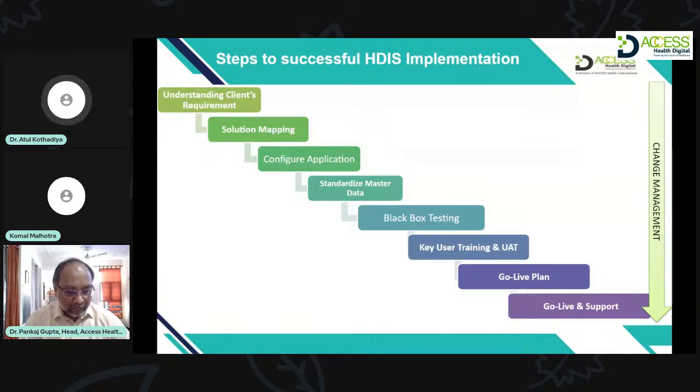Now, for each and every stage listed in this slide, the client and the vendor will take sign off on a written document that all the requirements are recorded correctly and correctly identified by the implementation team. This formal process is called the sign-off process.